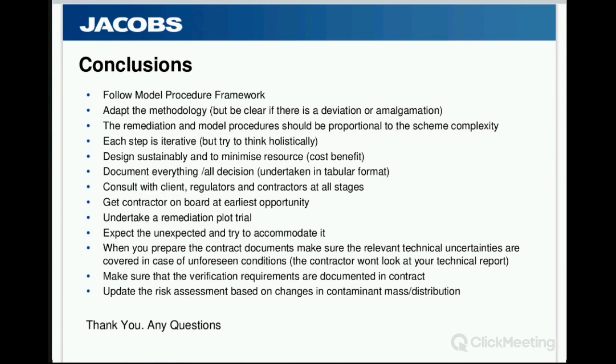Document, and this is essential, document everything, all decisions, even if it's in a simple tabular format. It doesn't have to be War and Peace. Just simple outcomes, who was involved, etc. Quite often in peer review, which you do a reasonable amount of, these processes are just opaque, and you can never get to the bottom of why precisely this solution was chosen.